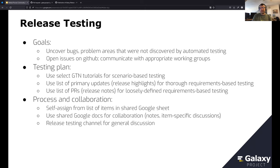We also use a list of primary updates — the major features highlighted in the release notes — and give those special attention to make sure they work as expected. There's also a list of PRs included in the release notes for more loosely defined requirements-based testing. For collaboration, we have a shared Google Sheet with self-assigned items, Google Docs for item-specific discussions, and a release testing channel on Matrix for general discussion.